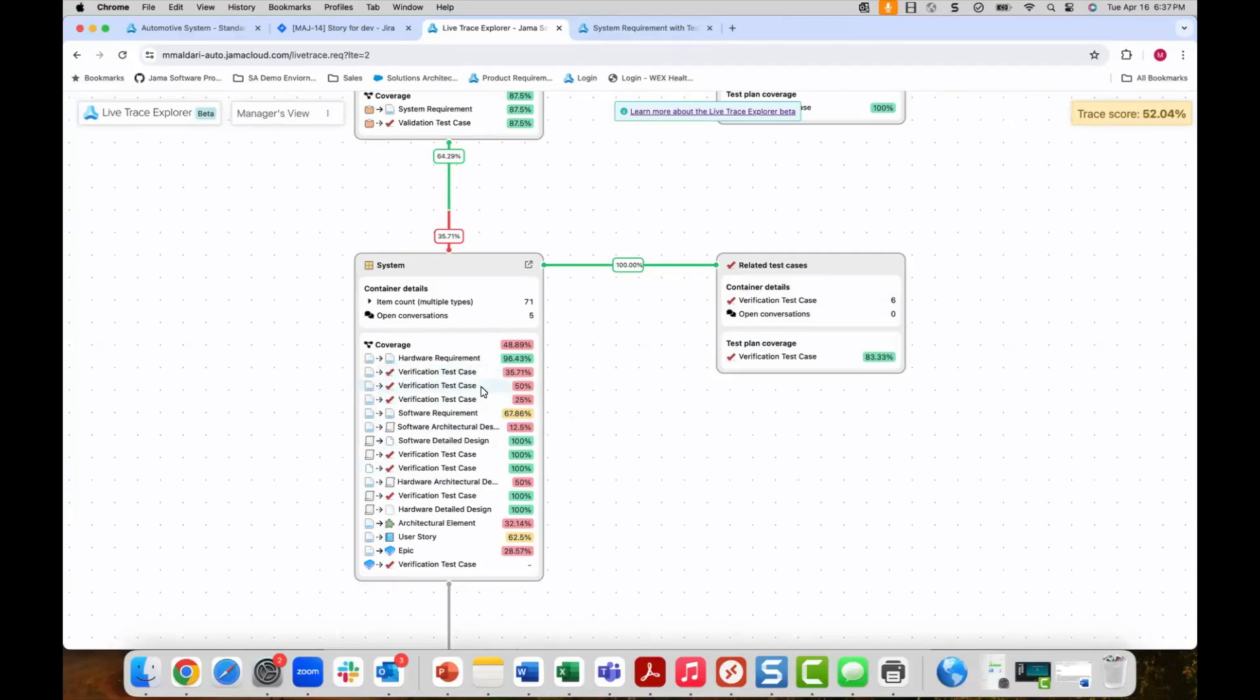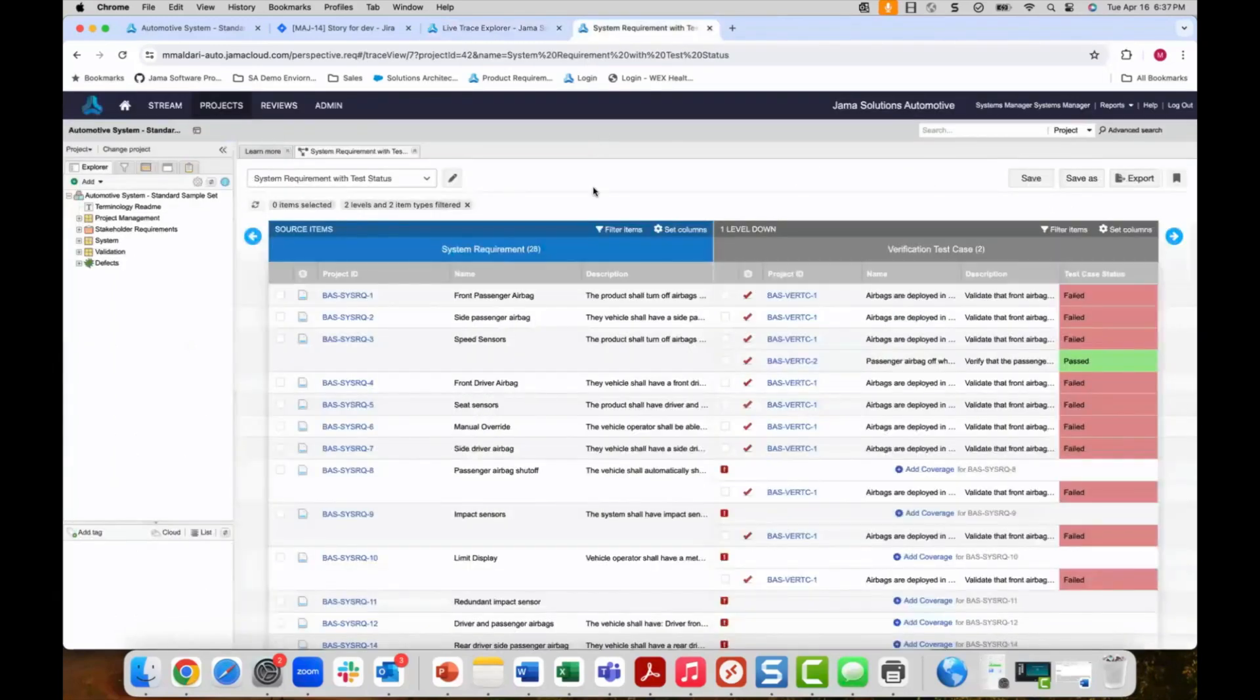How do I know which product requirements have failed to pass tests? This can be tracked by digging into coverage from the trace explorer and displaying the test status.